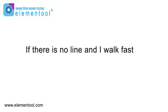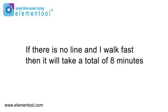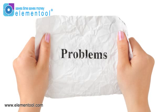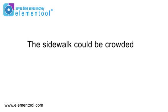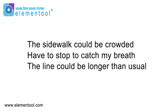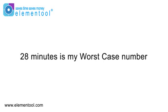If there is no line and I walk fast, then I think it will take a total of 8 minutes — so that's my best case number. Now for my worst case number, I have to consider what might go wrong. The sidewalk could be crowded, I might nearly get run over by a taxi crossing the street and have to stop to catch my breath, and worst of all, the line could be 3 times as long as usual because everyone is stocking up on snacks for the big game tonight. I figure that puts my worst case number at 28 minutes.